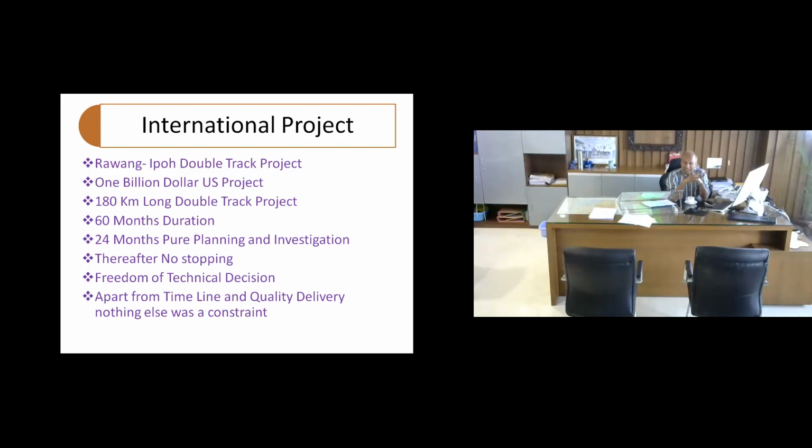So I asked my CRE, chief resident engineer, Mr. Chu, who was a Chinese gentleman, why Mr. Chu, why are we not at site? We have already lost 18 months. He says, wait for 6 more months. Our planning, design, investigation time is 24 months. Then you will see that there is no stopping, and you can see that thereafter we will be working all 24 hours and all throughout the year. And that came out to be true after 6 months.